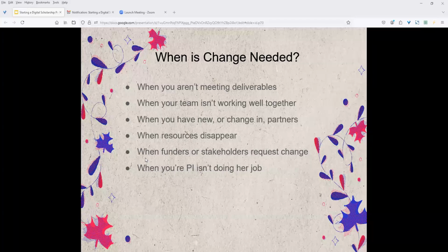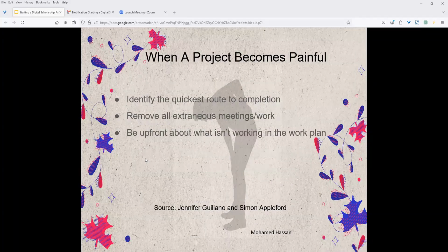So I've talked with people on projects and you would not believe it. You would think a principal investigator would be totally into the project, right? Because they're running the show. But I've had people tell me that they'd send material to a particular principal investigator and they wouldn't hear back from him for 3 or 4 months. So that's not going to work for a project that's supposed to be moving forward. So basically, the project manager has to lay down the law and say, if we don't hear from you by a particular date, then we will be stopping work on the project. So these are the things where it can get possibly quite personal.